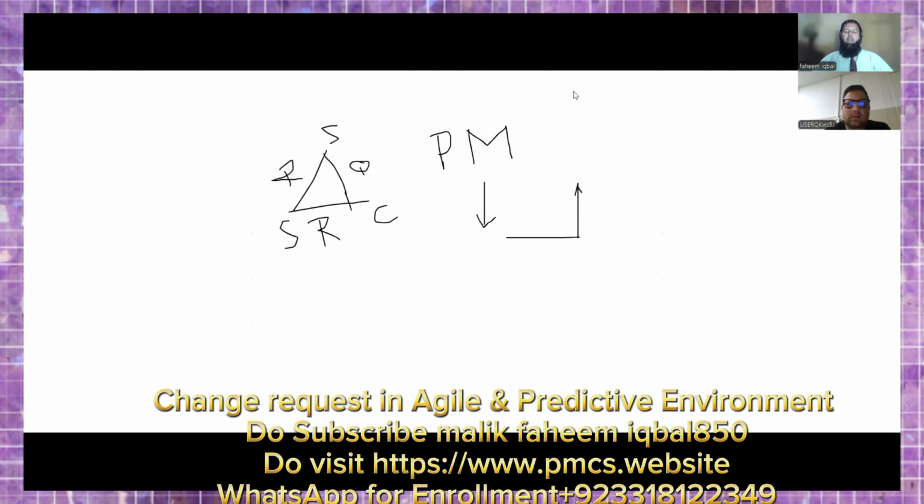Yes, sir. Okay. We will do a detailed impact analysis, and that change request the project manager will send to the CCB. What is CCB? Change Control Board. The Change Control Board deals with the change request. The Change Control Board is responsible for all the things that are done inside the project. In the Change Control Board, the PM is part of the board, along with the stakeholder and sponsor. These three bodies are inside the change control board.